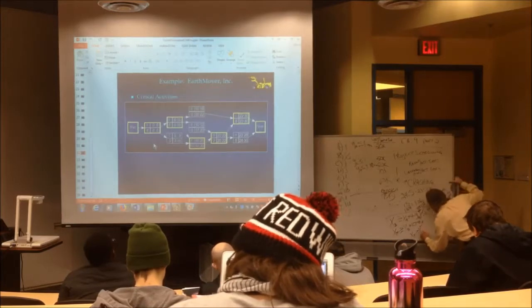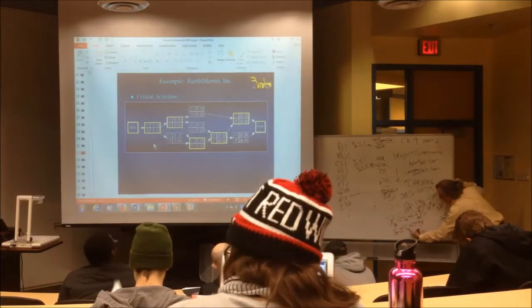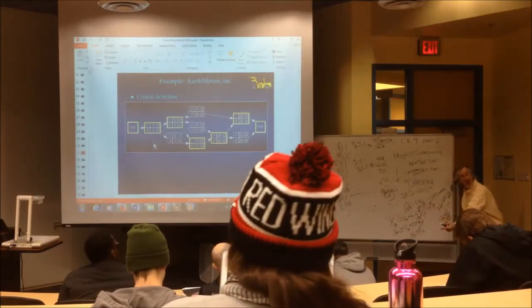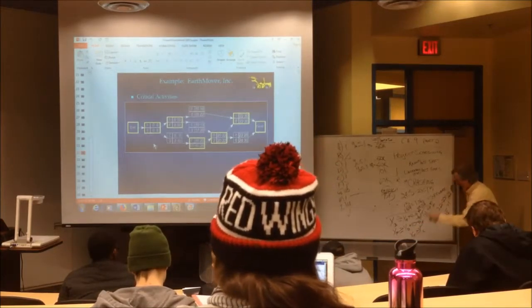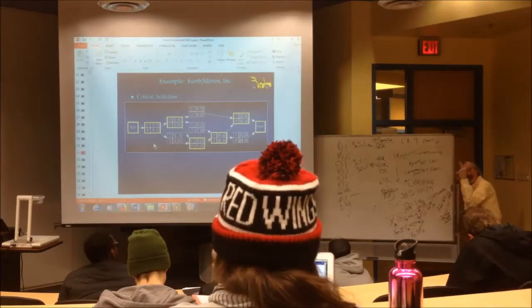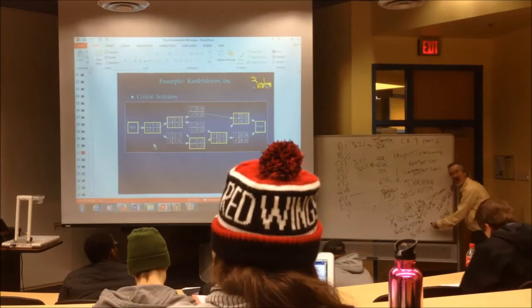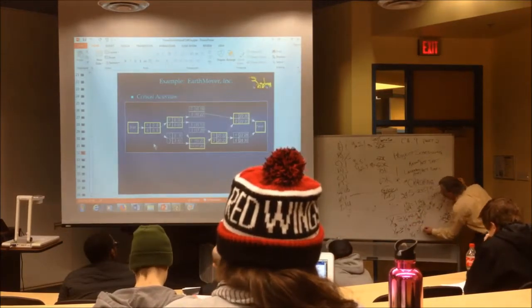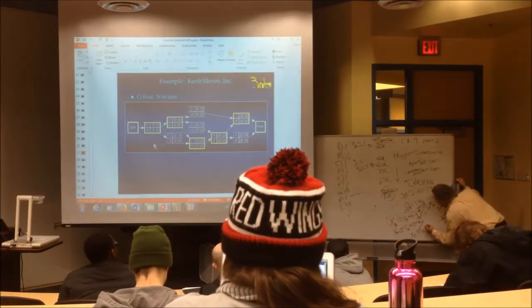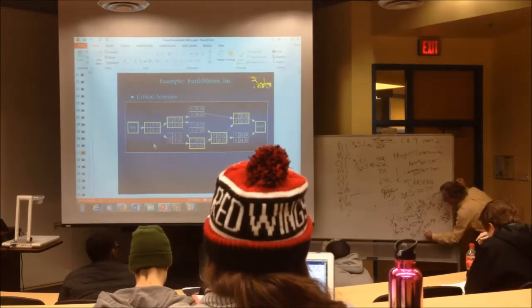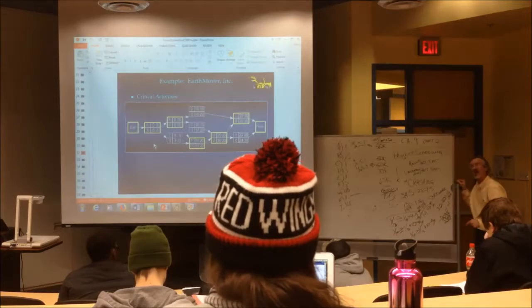C. Nothing changes except for that letter of the X that precedes the one we're writing it for. And we have to write X sub F twice because it has 2 activities preceding it. If it had 3 activities preceding it, you'd have to write it 3 times. Only that one little change of the preceding activity, plus 10 minus Y sub F. Nothing else changed but that X sub B here and the X sub C there.